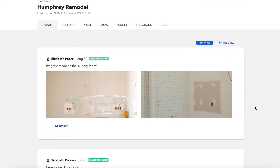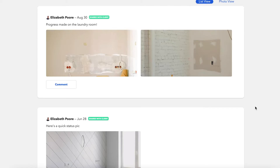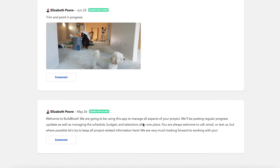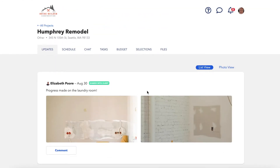The updates tab in their dashboard is the first thing your client will see. This information comes straight from the daily logs that you've chosen to share with them, and it's a great place to give them regular updates on the progress of your project. We recommend creating a welcome post for any new projects in your daily logs that you share with your client, just welcoming them and letting them know that you'll be using this platform for all of your project updates. That way, if you don't have any other updates when they first log in, it'll be the first thing they see on their page.